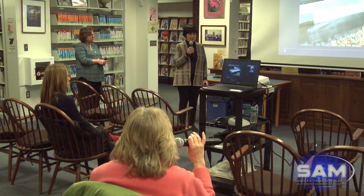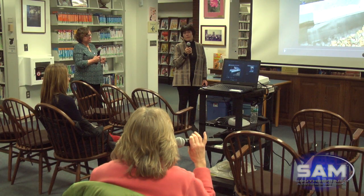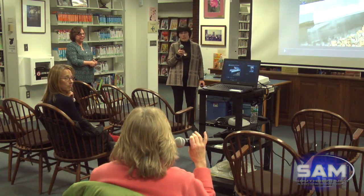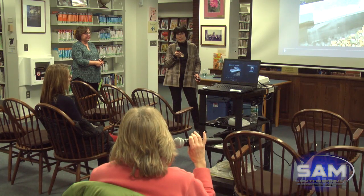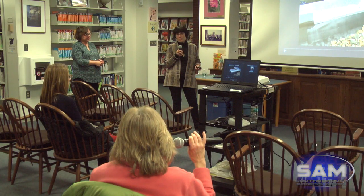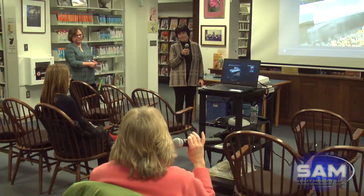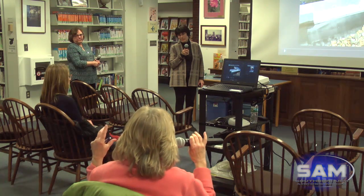So I don't see a way of patching this roof right now and giving you any reliable lifespan at all. I think you would create more problems by putting off what is quite honestly in front of you. This roof also technically has reached its lifespan. So if I were to suggest anything, it would be to replace your roof. And we have priced this with one of the most economical roofing systems you can buy. What is pushing up the cost is the masonry work that has been caused by poor roofing details.